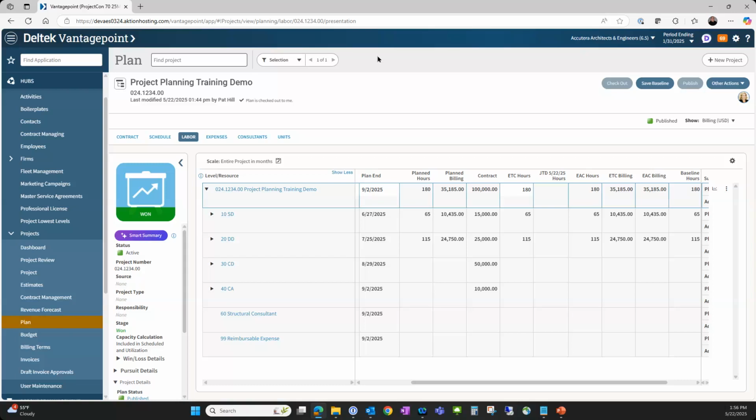And then we've got one last one. Can you re-baseline to just add new tasks or change orders? You can re-baseline, but you're going to lose the original one. It's a good point. If I have a huge scope change to the original project and my original baseline really doesn't have any bearing anymore, I can save a new baseline, but just keep in mind you'll lose the original one.